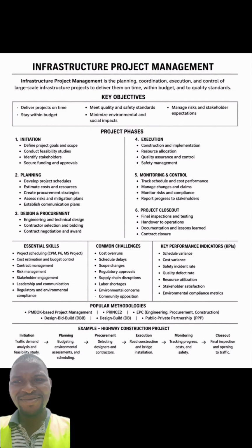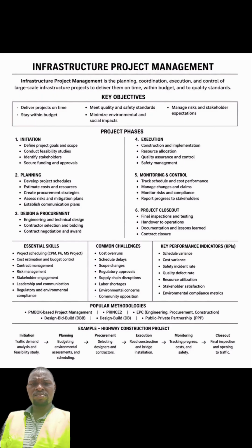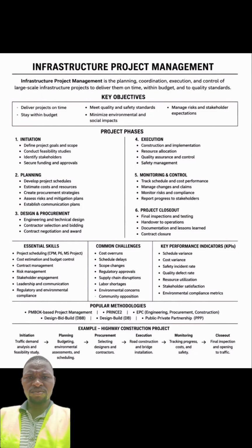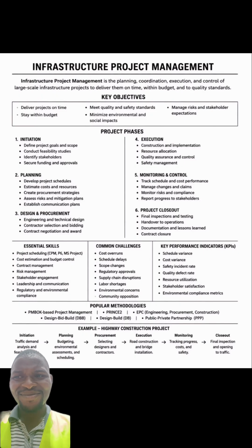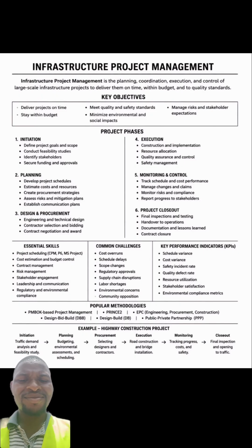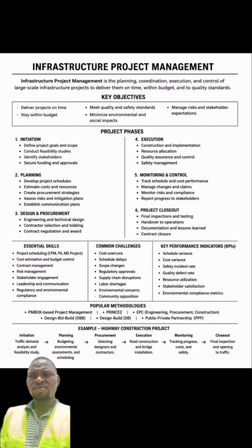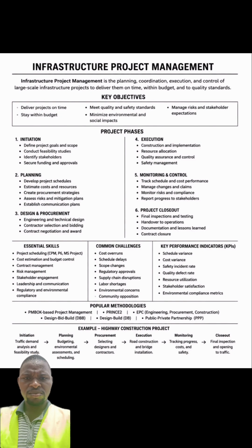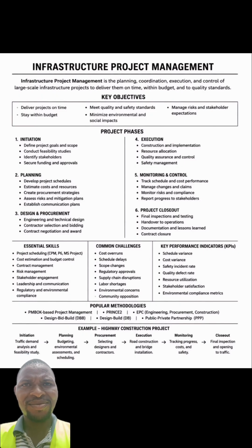And contract negotiation and award. After selection they tend to do all these negotiations to know who is going to give the least price, because price is involved here. So figures are very, very important. You give the figure, they do comparison with the figures that you've been given. Maybe at the end of your BEME, yours results to maybe 50 million, and the other partner results to maybe 45 million. In as much as they are going to give the best quality at a low price, then the contract will be awarded to them.